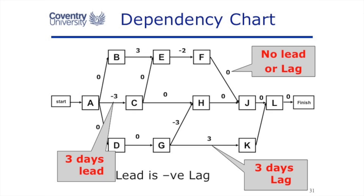In lecture three, we looked at dependency charts. And this is how we display lead and lag on the dependency charts. We don't normally put a zero in. We just leave it blank and there's no lead or lag. If there is a lag, a delay between tasks, we put a positive number. If there is a lead, we have a negative number.